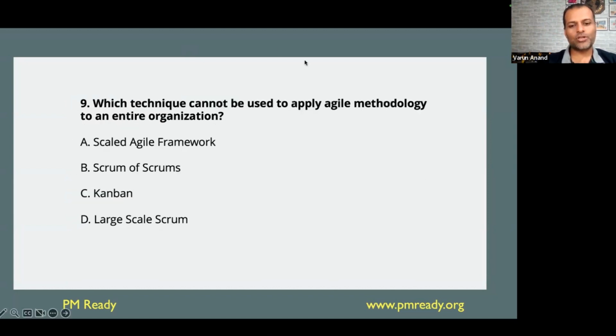So it is based on the outcome, not the length of the work. It's technically the length of the work only, but you don't say that this length of work is equivalent to 2 hours or 2 days. You just say more about like two story points worth of work. So you do it in that aspect.